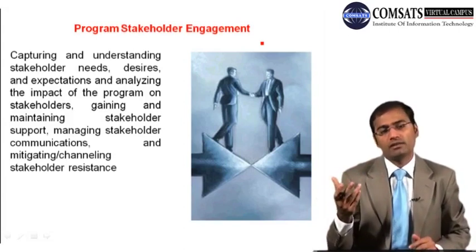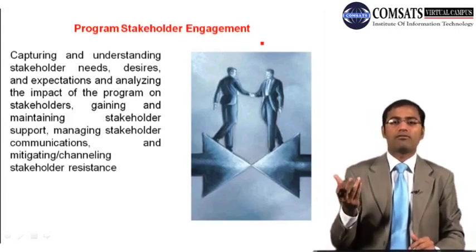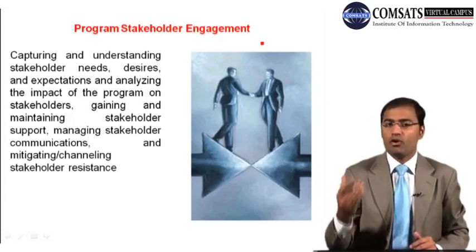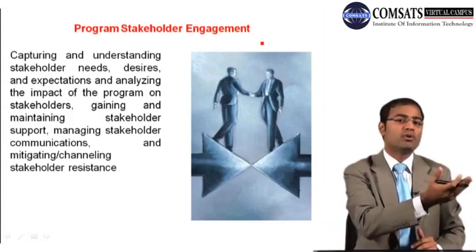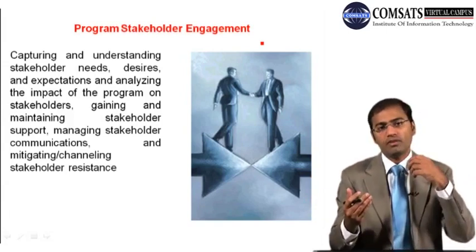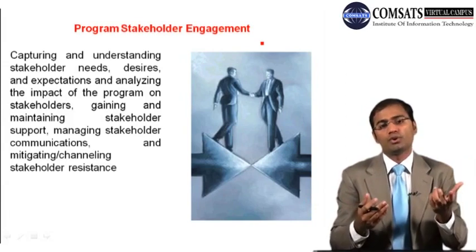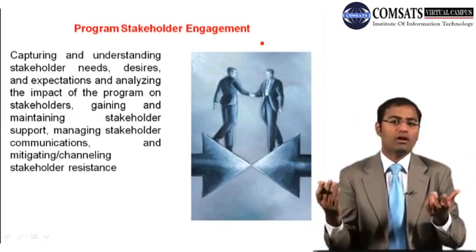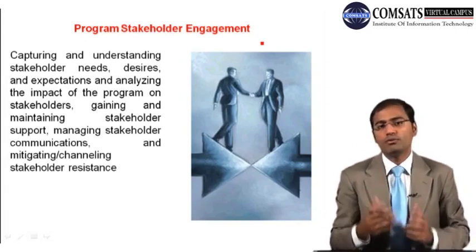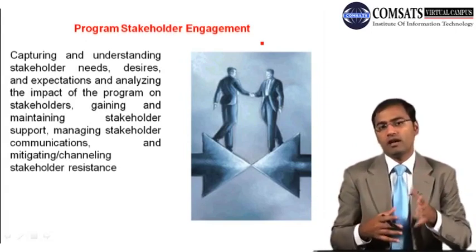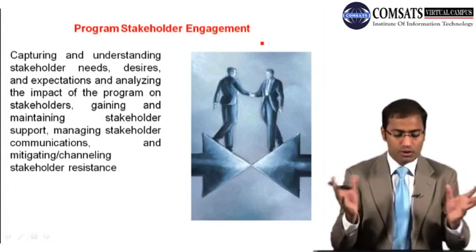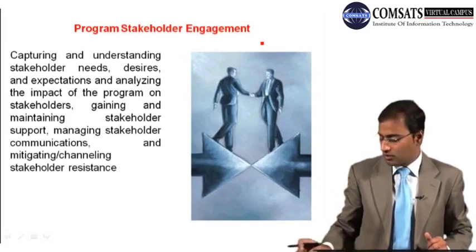So how do you manage the expectations of positive stakeholders? You want to enhance their support. You want them to influence the people who are negative against your program, and you want the negative people to be positive people. But if you cannot make them positive, at least make them neutral. And neutral people, you want to make them positive. If you cannot, you don't want them to be negative, right? So in this fashion, you are doing that stakeholder engagement.